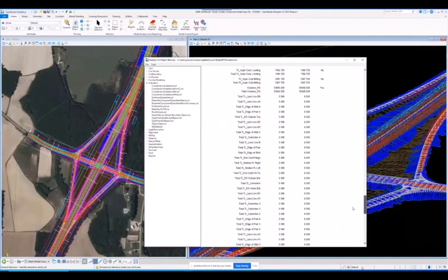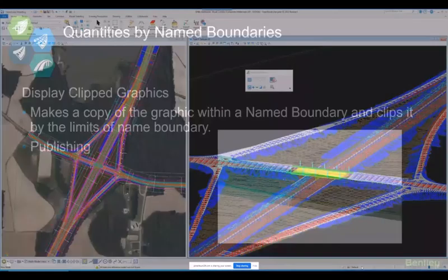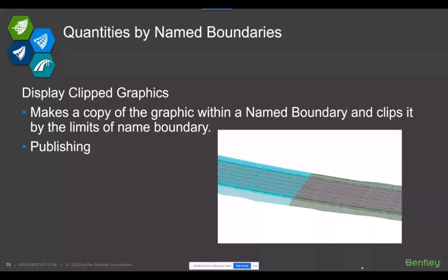You copy, paste, move them to Excel, generate your costing appropriately with the appropriate costs that you have, and add your contingency in and get your cost estimate to your boss quickly. That's the name of the game here. So let's take this even another step.